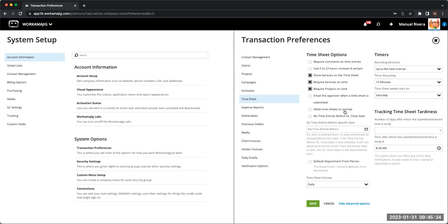And before we turn this on, I would say, because this is going to allow you to then have a new timesheet for that same day with the correction, you can just choose to, again, for the week, maybe, because maybe it's just the next day, just put in a negative amount. Obviously, if you're adding more time, you add a different amount, right? And you're transferring time by lowering buckets and increasing buckets on a different timesheet. And if you're okay with that, then that's perfect. Then you get to still keep your rules of one timesheet per day. But if that still doesn't work, then that's where this comes in.